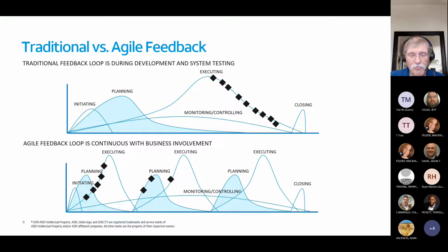And I have personally been on defect calls where the defects number in the hundreds, classified Sev 1, Sev 2, Sev 3, Sev 4, Sev 5, and realizing that Sev 3s and below are never going to get touched because it's too expensive, and the result from addressing them would be just too costly.